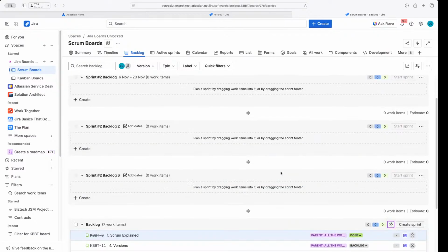You'll notice something though, when I create the sprint and I create multiple, it automatically just keeps a sequential value. So pro tip, when you are naming your sprints, you definitely want to name it in a way where the number will fall and create a sequential, so then you don't have to come in and rename the sprint every time. So you can use this to your advantage.